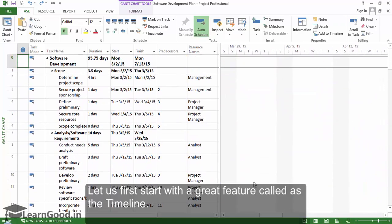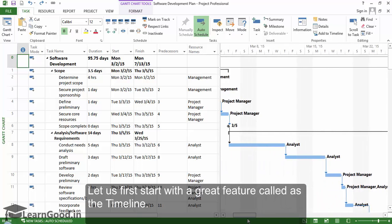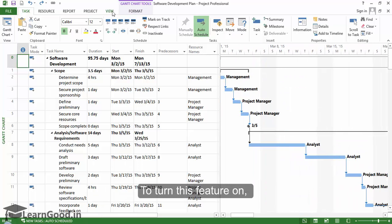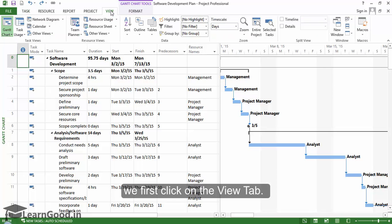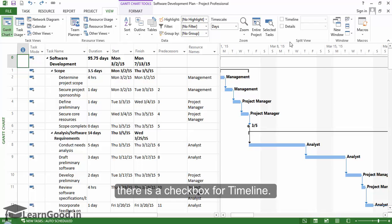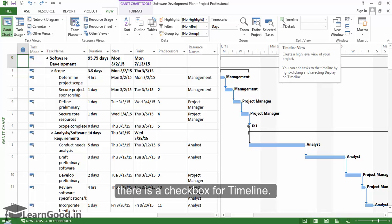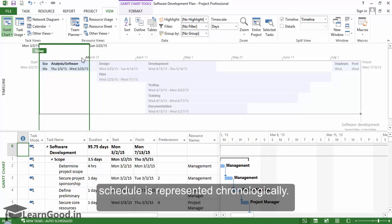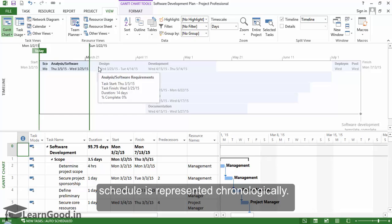Let us first start with a great feature called the timeline. To turn this feature on, we first click on the view tab, and here in the split view section there is a checkbox for timeline. When you check this on, a new window appears where the schedule is represented chronologically.